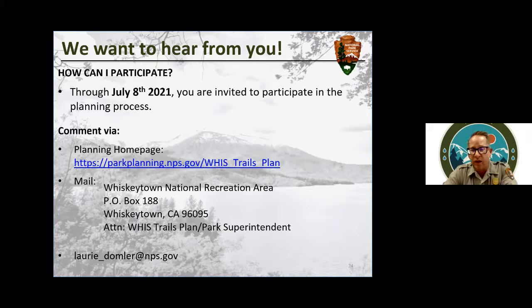We are looking to have the lower half of the Brandy Creek Falls Trail open probably late summer, early fall, and we're looking to extend up to the falls next spring, hoping to have that open soon. Just that trail alone, by our best math and the system we put into place for calculating costs, is about a $600,000 problem that we have to find money for and redirect efforts to make happen.